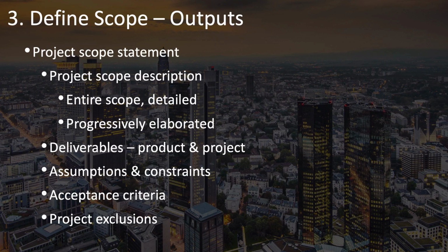You also need to include any project exclusions, anything that was discussed or that you think people might think is in this project. You need to be very clear and explicit about mentioning and listing those items that are not part of the project.